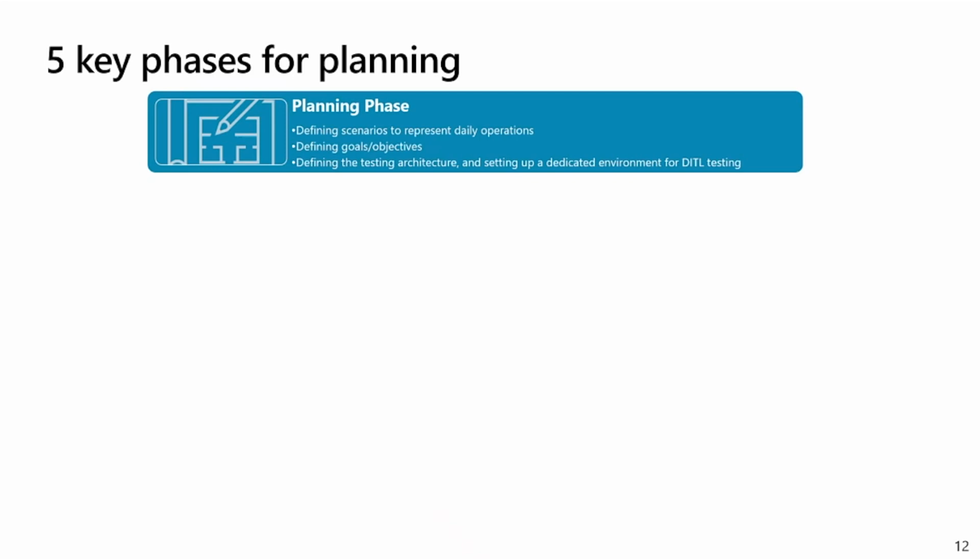The performance validation tells us, we can say you need about 15 minutes to complete the sales operation posting. And then in the purchase order, maybe you just need 5 minutes to complete the purchase order posting. But what is the final result they expect if both sales and PO operations are mixed together in the system? So finally, is it 15 minutes or 30 minutes? So we need to have a clear expectation and call it out together. And then we have the expectation for us. That means we can do the optimization based on that expectation.